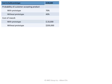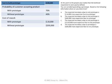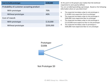To solve this question, most likely I would draw a decision tree. With this decision tree, I'm thinking: should I prototype or not prototype? The table tells me it will cost $100,000 to build a prototype. Obviously, to not build the prototype would cost $0.